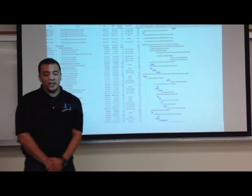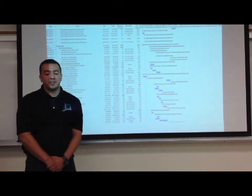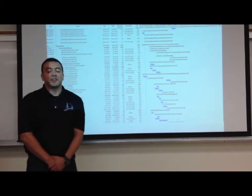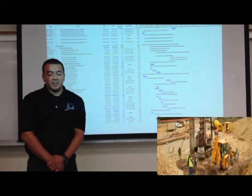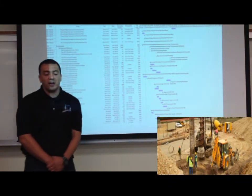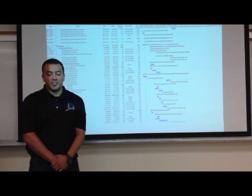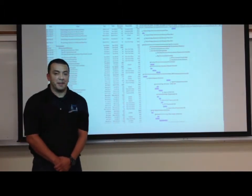Our project schedule includes the principles behind the development of the schedule, overall schedule, as well as the means and methods which CDG&K will use to control the progress of the work to meet the contractual completion dates presented in the project schedule. The technical aspects of the project schedule will be constructed virtually as 3 separate, highly focused projects to allow for a compressed schedule for each significant area of work. The first area would be the pre-stress post-tension girder bridge. Second, north and south abutments. And third, the roadway realignment.